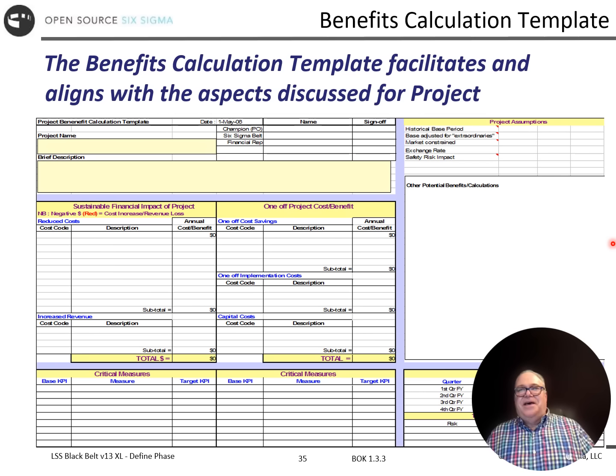If I can tell you, a lot of times people come to me and say they don't know how to calculate the savings, and I'll say, well, what's our goal? Well, we think we can take about 100 hours a month out of the workload by doing this project. We're going to write some macros. We're going to have better data that comes into the input. We're going to standardize the output templates. And I'm like, okay, well, shoot, 100 hours a month times 12 months, that's 1,200 hours, times like $100 an hour, $75 an hour, $125 an hour, whatever you want. Hey, that's some good dollars, right? So let's not get over calculated, right?